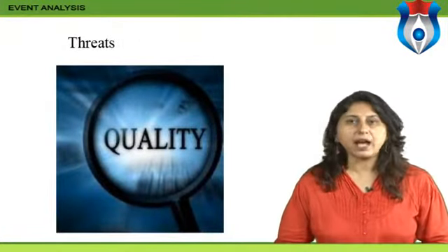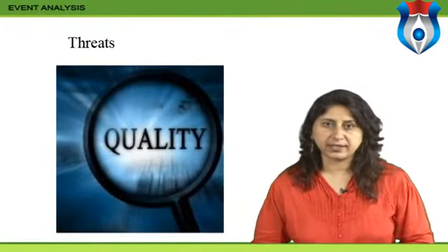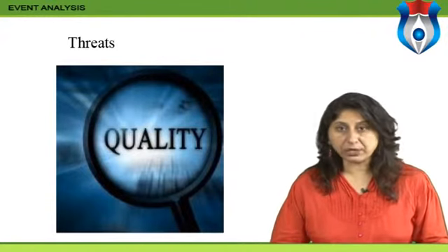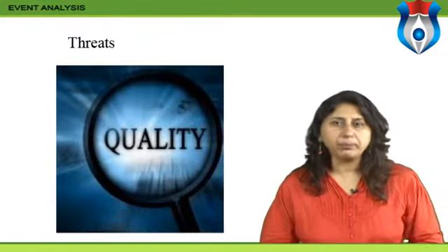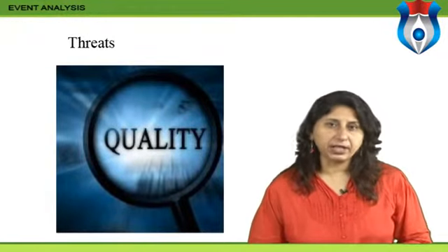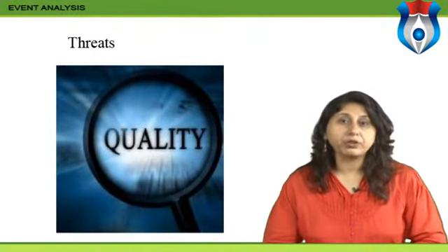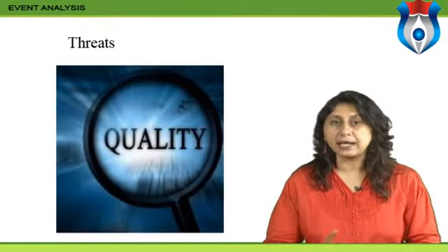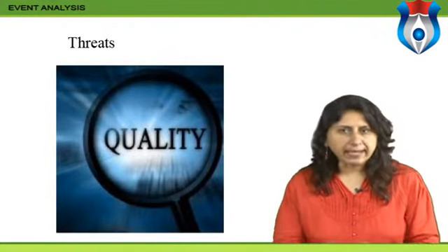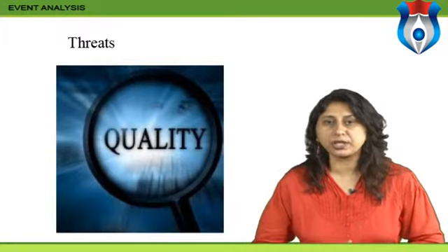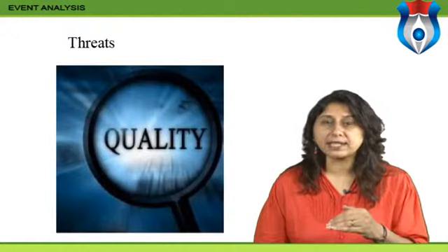Threats. These are those external factors which are harmful in achieving the project's objectives. For example, high competition, little or no support from local authorities, bad weather, poor infrastructure, high labor rate, unavailability of raw materials, etc. It is very important that we conduct SWOT analysis before developing an event plan to develop a strategy which maximizes the potential of strengths and opportunities of the project and at the same time minimizes the impact of the weaknesses and threats.